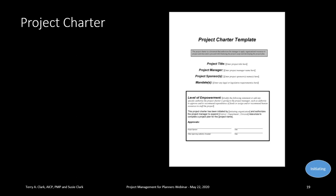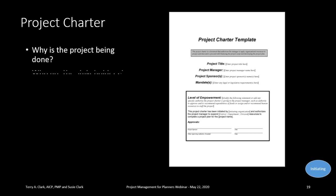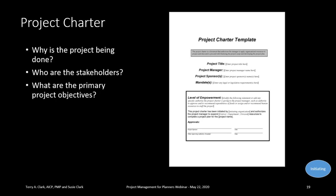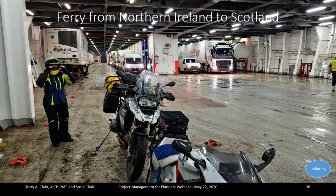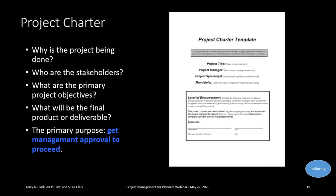For Susan and me, she gets final sign-off — she's the manager in terms of our overall charter, and that has been a negotiated process over the years. Remember, 90% of a PM's time is communication — the charter is a form of communicating. People say they don't know how to do this or aren't sure how much time it will take. I say: put something on paper, because whatever you put down the first time is not going to be the final product — it will be revised. The primary purpose of the charter is to get management approval prior to proceeding.